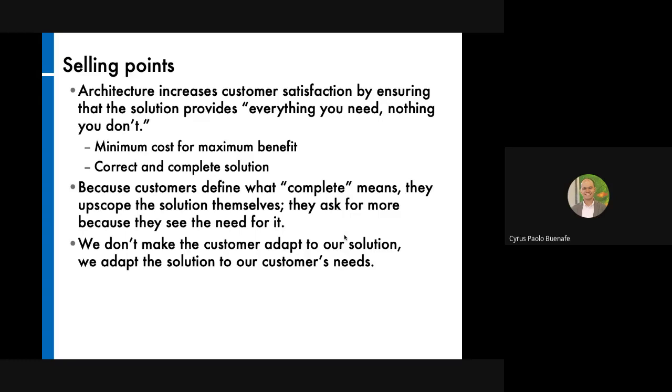We shouldn't be scared of the customer expanding the scope. Of course, from a project management point of view, you don't want to engage in what is known as scope creep. That is fine because you're now executing the project. But in this case, you're still crafting the solution, so it's important that you go as wide as you can and really push the envelope, because you're still at the starting phase. You're trying to establish your boundaries. So we shouldn't be scared of expanding our scope further and further when we're defining the architecture.